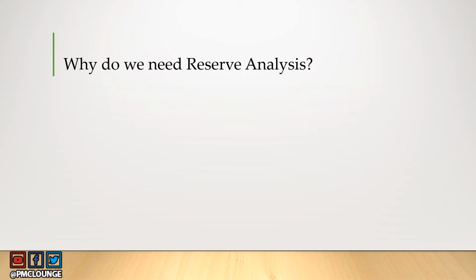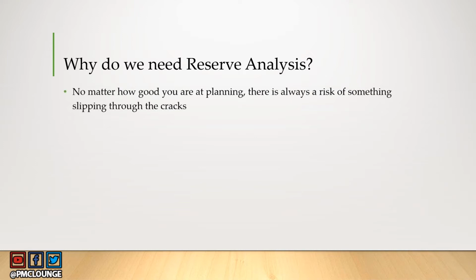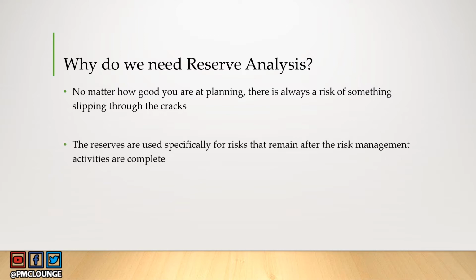So why do we need one more tool? Why do we need reserve analysis in the first place? First of all, no matter how good you are at planning, there is always a risk of something slipping through the cracks. You may be the best project manager on the floor, but in your planning there could be something that you might have missed. These reserves are used specifically for risks that remain after your risk management activities are complete. After your planning is done and maybe you missed planning for something, you can use these reserves for that. And after your risk management activities are done, maybe there are risks that still remain or risks that you were not able to identify. These reserves can be used for those risks as well.